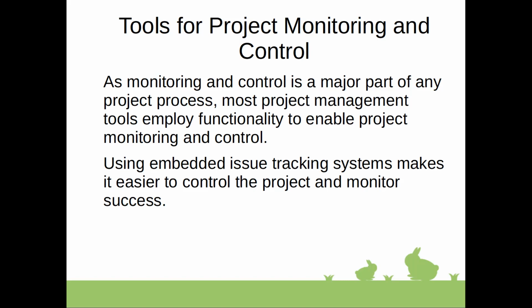And these just provide good signs. For instance, if a lot of people are asking you for reports, it means that you're not sharing enough information. If projects frequently run over time or over budget, it means there is something wrong with project performance control. So basically, keep an eye on indications and make sure that proper tailoring of the processes and ideas for the project is done beforehand. It's a step towards a successful project.